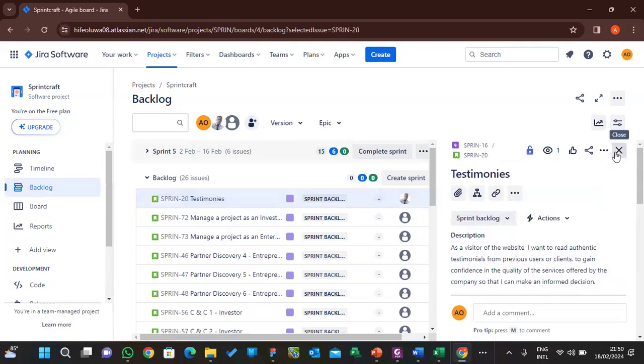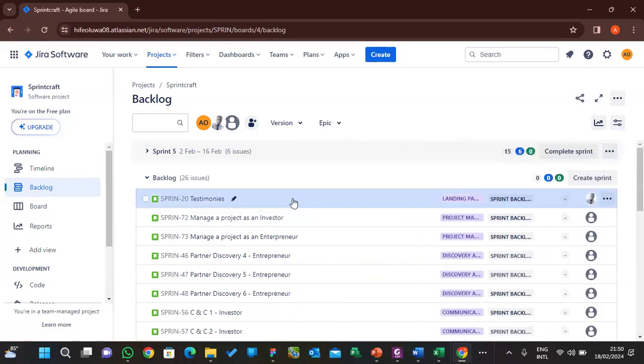So developers, including testers, will all be there to look at it by voting, to reach an agreement that okay, we are choosing 5 story points. We are giving this user story a relative estimate of 5 story points. The reason is that maybe they've considered the risk, they've considered that they're going to do back end, front end, and design before the tester. These are things they're going to consider. After they have considered all this, remember I said this is their phone, right? These are the estimate for that phone now, 5 story points. That's the workload, the estimate for this phone.